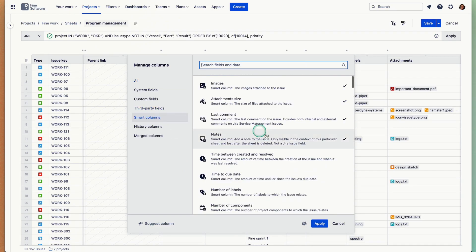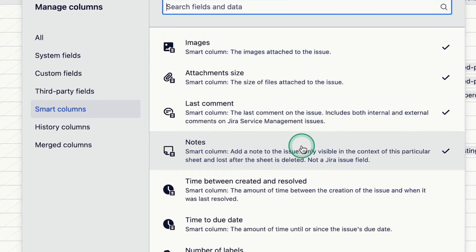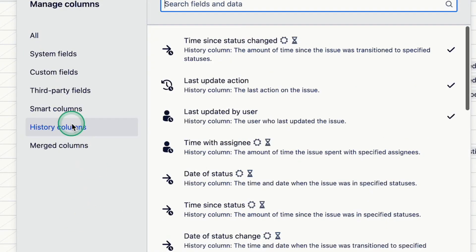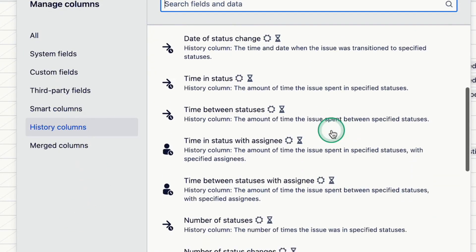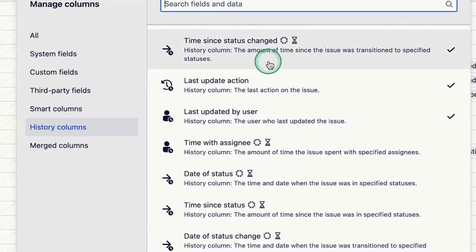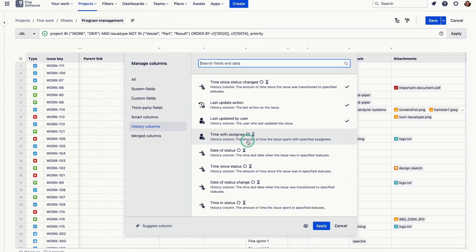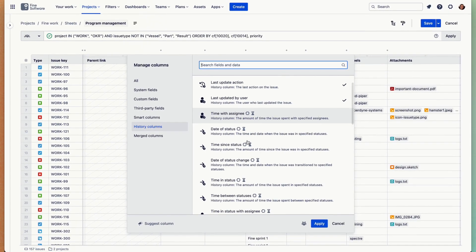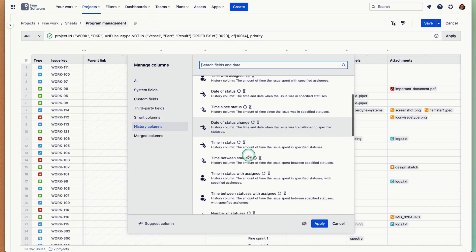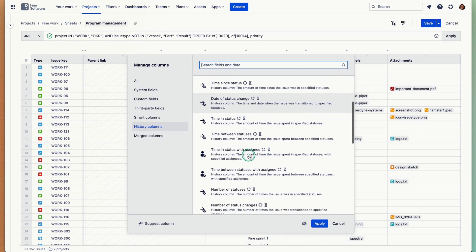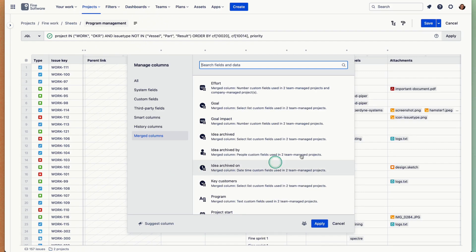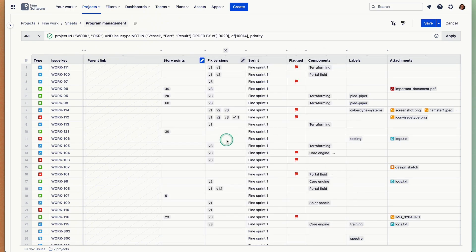We have smart columns which are sort of calculated values. We have history columns where you can do stuff like time since status or time in status, time between statuses, time with assignee. There are merged columns which merge fields from team-managed projects and company-managed projects of the same name and type so you have one column that works across issues from different projects.